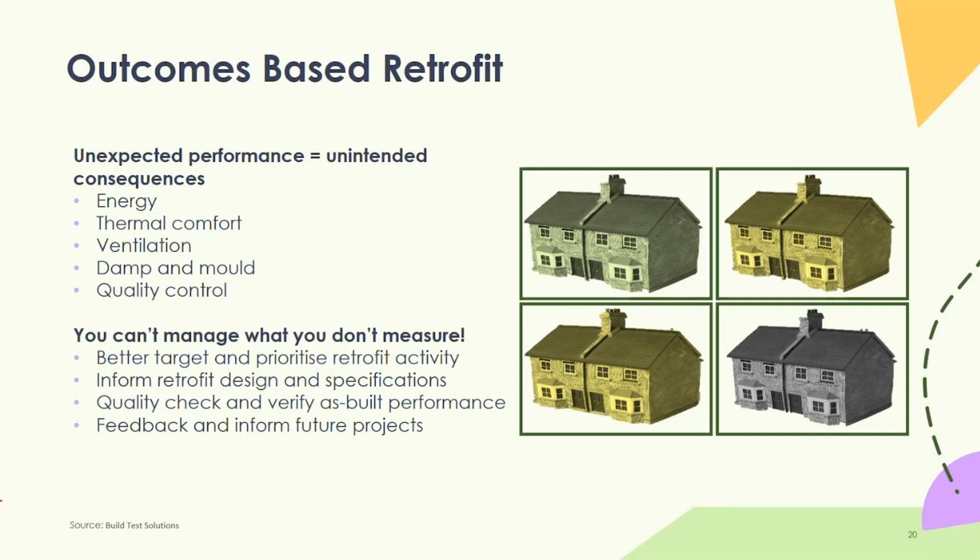So I don't think we're far away from a world whereby measured performance forms part of procurement contracts and things. So hold contractors to account based on the delivered performance, not just the theoretical before and after EPC rating, or the modeled before and after EPC rating that can be manipulated to suit what was originally sought. So measurement can be a very objective, robust way of checking and verifying outcomes. And then of course, by measuring, you're improving feedback loops and informing future projects about what works well and not so well.